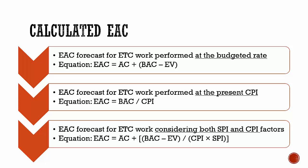The first EAC forecast assumes that ETC work will be performed at the budgeted rate. This EAC method accepts the actual project performance to date, whether favourable or unfavourable, and predicts that all future ETC work will be accomplished at the budgeted rate. Simply speaking, whatever happened so far, since today we will perform according to the plan.